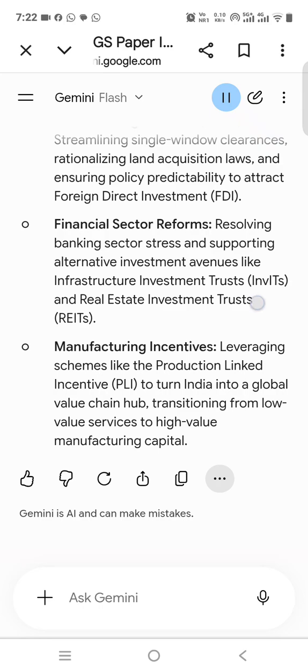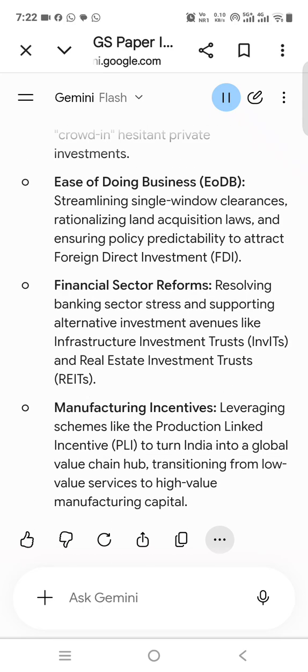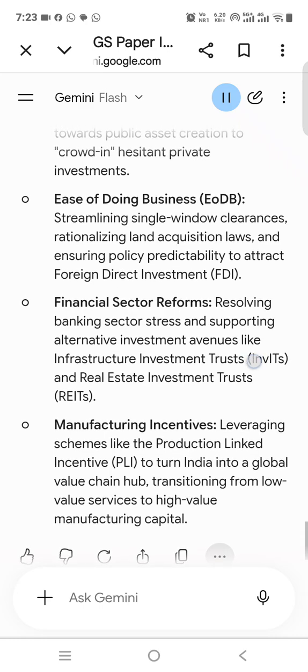Major challenges faced by PPP projects in India: regulatory and clearance delays, bureaucratic red tape, delays in land acquisition, and environmental clearances often lead to massive project delays and cost overruns. Aggressive bidding. Private players often overstate projected revenues, e.g., traffic estimates in highway projects, to win contracts, leading to unviable projects later. Twin balance sheet problem. Highly leveraged private companies and rising non-performing assets, NPAs, in the banking sector have severely choked credit flow to infrastructure.